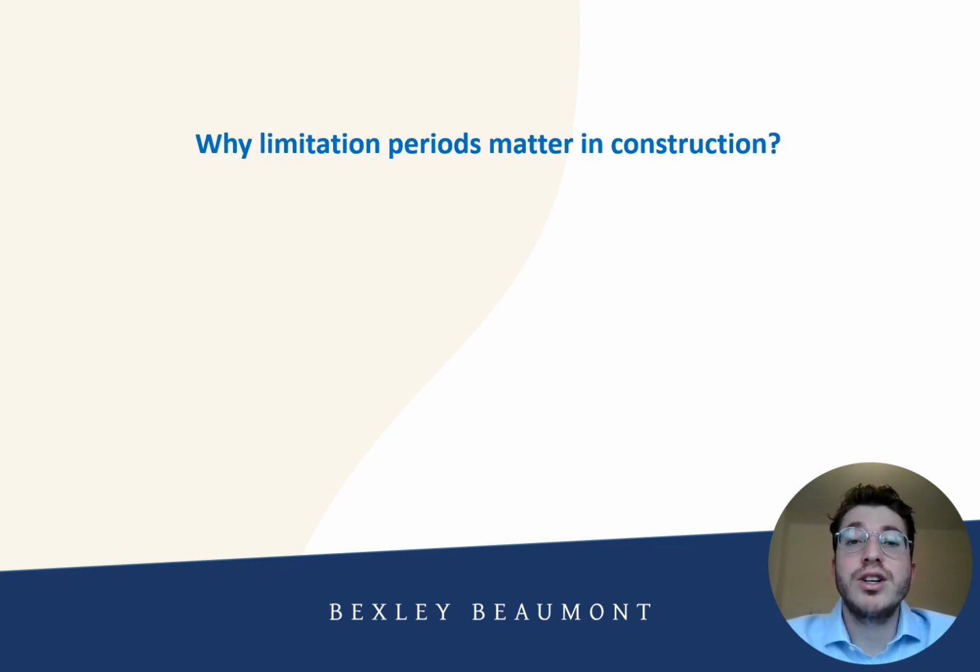So why do limitation periods matter in construction? They matter because many issues, such as by way of example latent defects, may not surface until years after the project is completed. As I've just said, if you miss the window to file a claim, it could mean being left with no legal recourse for those latent defects or any other issues that arise post-completion. On the other hand, for contractors, limitation periods help provide certainty and closure, setting clear limits on liability over time.